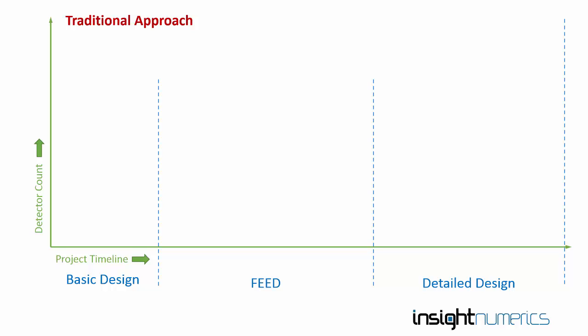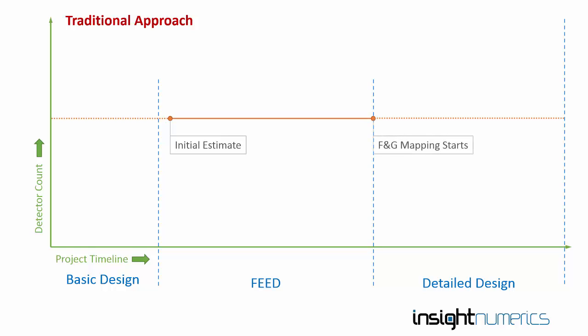Traditionally, the initial estimate of Detector Count is made quite early in feed, well before the fire and gas mapping actually starts, which is usually in the Detail Design phase. The problem is that there's a huge discrepancy between the analysis techniques behind the initial estimate — which is usually nothing more complicated than a simple sketch — and the fire and gas mapping.